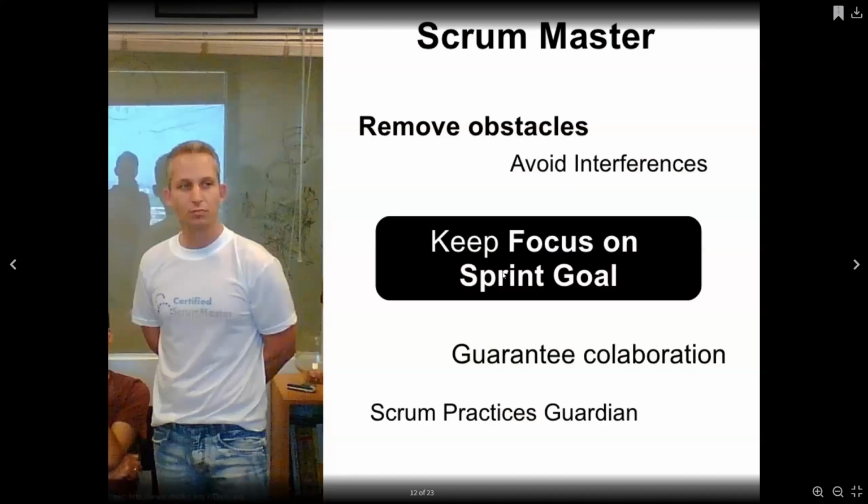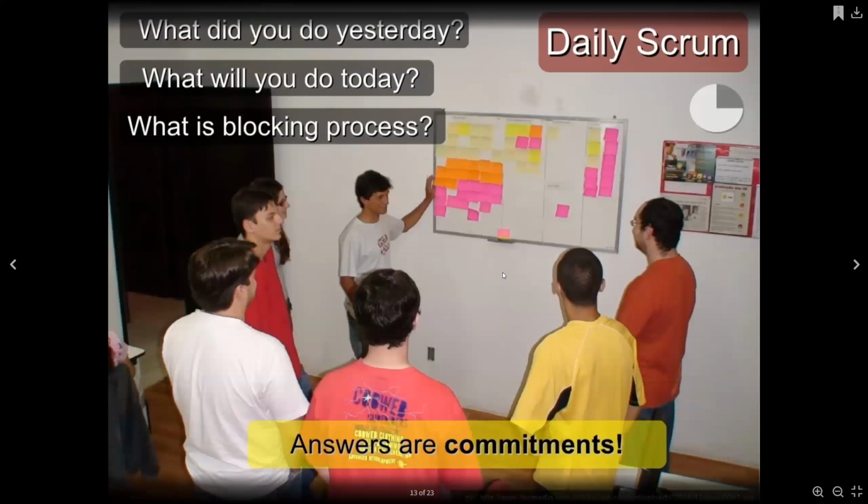So an example of the daily Scrum, you all come together quickly to this table. Now, in the virtual world, we have virtual Scrum using software like Miro, but in a physical co-located team, there'll be a board where you go in, and there'll be all these things in there. So you ask questions like, what did we do yesterday? What are we doing today? And hey, guys, what's blocking you?